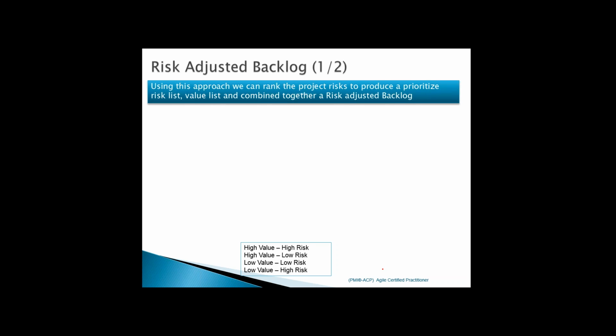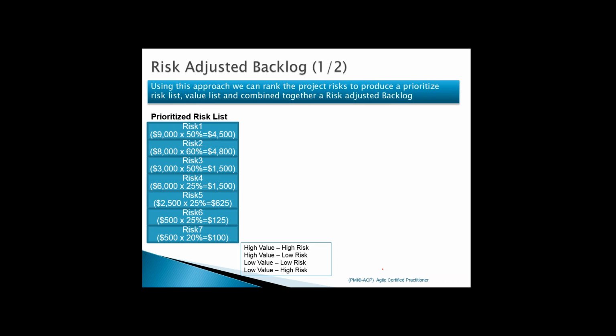All right. All this while we have been discussing value-based product backlog prioritization. Now we just discuss the risk-based prioritization. Please do not worry about these numbers here because I think these numbers are wrong. We need to revamp the slide. Focus on this. High value, high risk, always on the top.